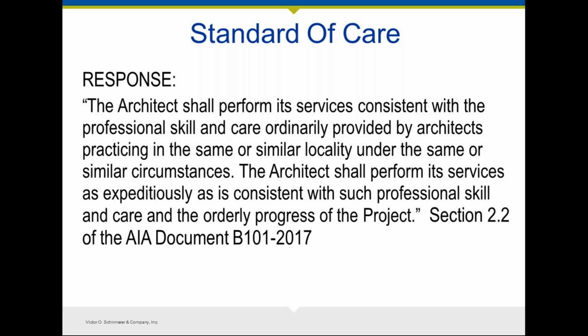So it's not just about negotiating and executing reasonable agreements. It also is important that your conduct during the project itself reflects what is prudent and that you stick to the agreement. If there are changes, then make sure that those changes are reflected in the agreement, and hopefully you're getting additional fees for those changes as well.